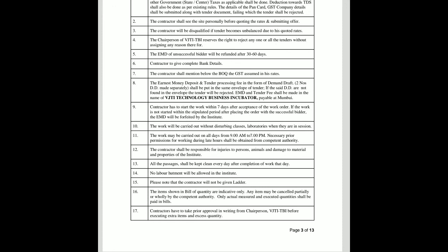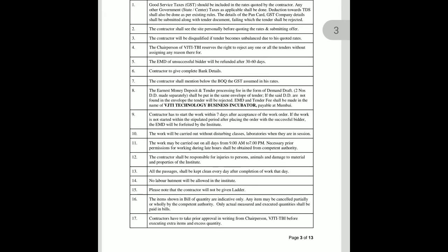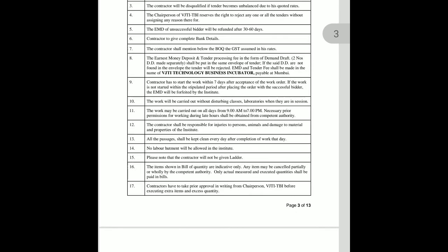The second condition is that the contractor shall see the site personally before quoting the rate and submission of the offer. The third condition is that the contractor will be disqualified if the tender is considered unbalanced due to their quoted rate. The chairperson of VJTI TBI reserves the right to reject any or all tenders without assigning a reason.